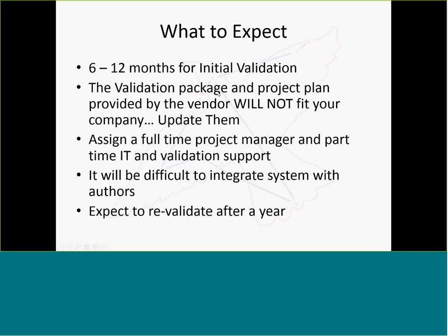Because they offer a validation package doesn't mean it works for you. Consider the validation package to be a rough draft and go through each and every single page and update it to match what you are doing, how you want to integrate in your system, and make sure you understand everything that's going on first.